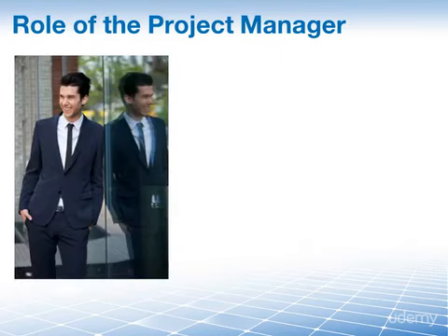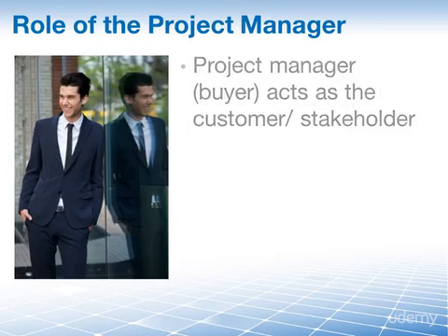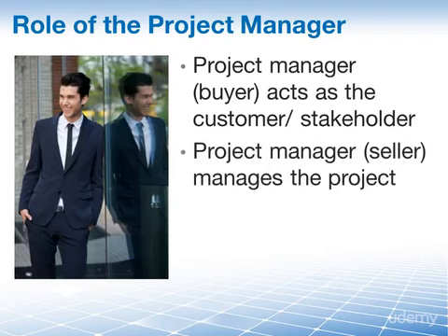And so we suddenly have two project managers. The project manager who's buying the buses and the project manager who is building, constructing and delivering these buses. The project manager on the buyer side acts as the stakeholder with purely his or her buyer hat on. They should follow all the processes relating to the project procurement management knowledge area. The project manager on the seller side manages the project and uses the processes from all project management areas that are involved in what he or she is selling to you. In our case here, buses.